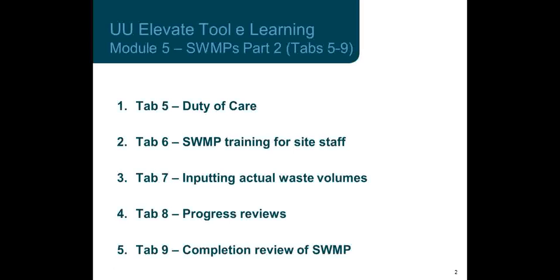are noted on there. And then finally, tab 9, once the project's finished, a complete review beginning to end of the Site Waste Management Plan is undertaken to take note of what the successes, any failures of the Site Waste Management Plan were, and carry forward any lessons learned. So let's have a look at each tab in detail.